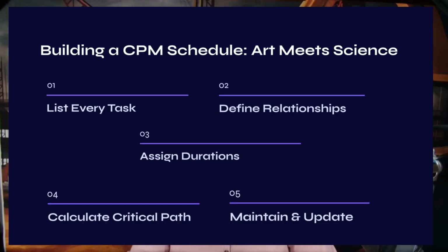Delivery methods will struggle with comprehension of the order of precedence of work and who gets to drive that. The most straightforward way to handle this is to identify activities, assign reasonable durations for each activity, and then begin negotiating with subcontractors, leaning on their experience of the most efficient and productive way for them to complete their work.